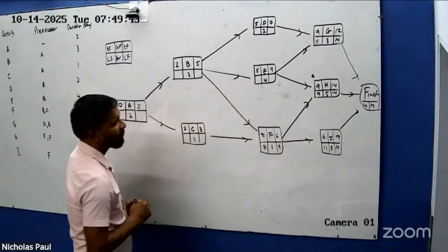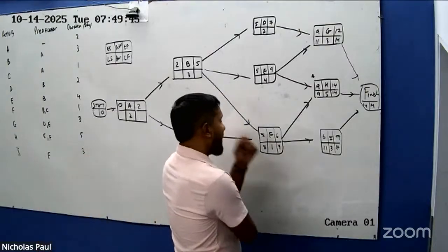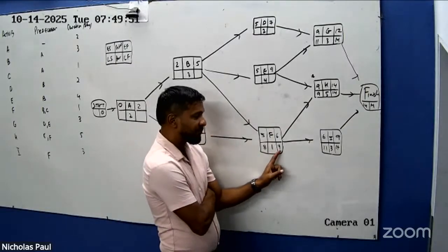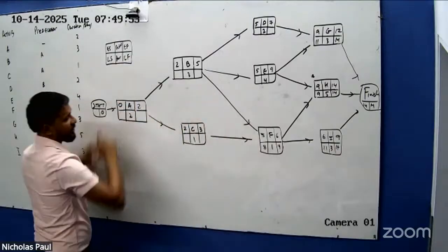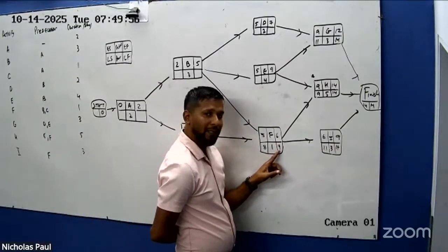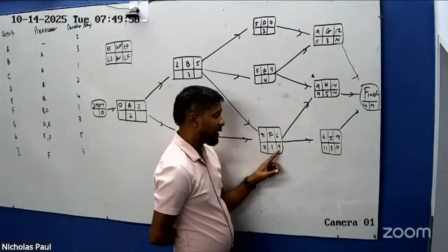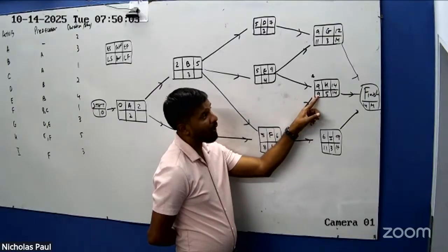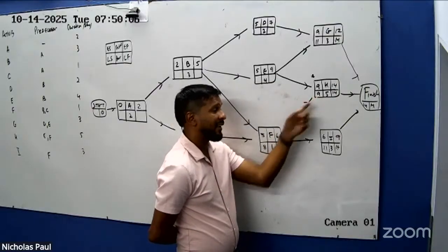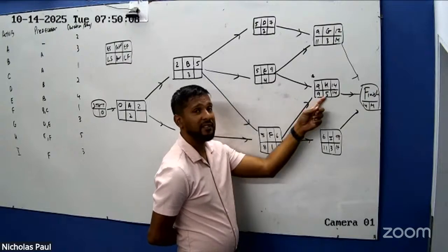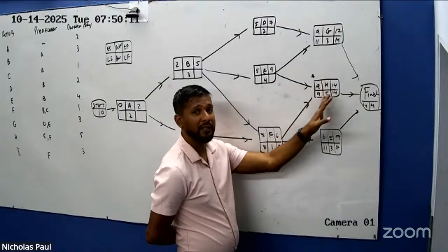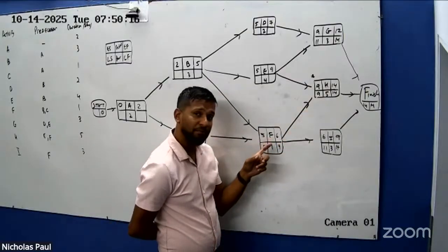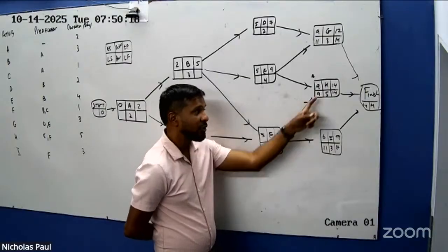Right? If I choose here, think about this. If I choose to finish this job, remember, latest finish, if I choose to finish this job at 11, I'm in real problems. Because if I finish this job at 11 days, what will happen to H? Right? If I finish it on 11 days, 11 and 5 is 16. Real problems there. H can't finish on time. So the latest I could finish F is 9. So I'm taking the smaller number.